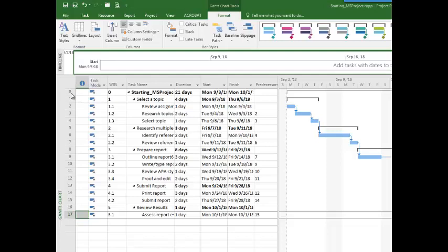This is called the task 0 line. The WBS number, the work breakdown structure number, is 0. It refers to the name of the project. The 21 days summarizes all the days in this column for the entire project. So now we've summarized the entire project.